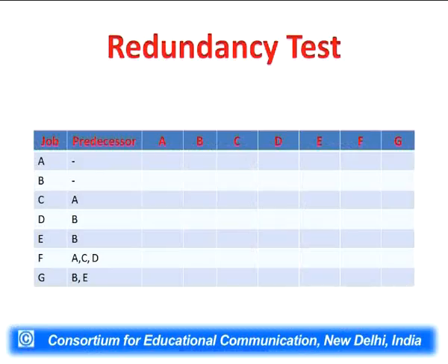Redundancy: while making the first table, when preceding activities are written, the project manager writes some extra information on the preceding activities which he should not be doing. So extra additional preceding activities are mentioned. So we have to find out which is redundant in the preceding activity column, the predecessor column.